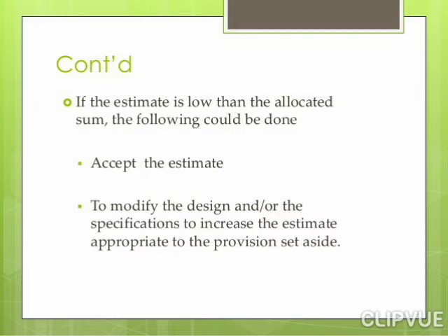If the estimate is lower than the allocated sum, the following could be done. We accept the estimate, or we modify the design or the specifications to increase the estimate appropriate to the provision set aside.